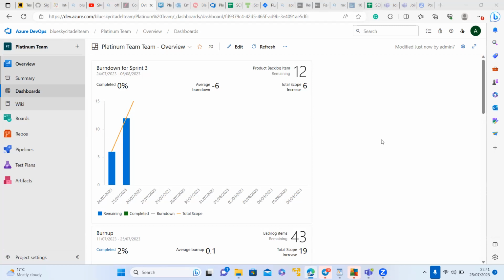Okay. See, the same thing I was saying is what Lola has put in the chat for you. She said, be careful of the amount of hours. Someone puts 10 hours for a task. You don't want to exceed your team capacity. Like I said, if you estimate too much, it's going to flag up. That chart will turn from green to red if you overestimate.